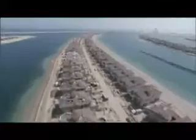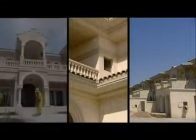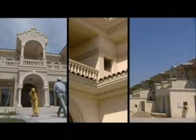Before construction, extensive environmental and baseline studies were undertaken to survey the Palm Jumeirah site. Our specialist marine biologist investigations determined that 95% of the sea floor beneath where Palm Jumeirah is now was in fact bare mud and sand. 5 years after the first grain of sand was laid in the Arabian Gulf, the handover of Phase 1, which includes over 4,000 residences, fast approaches. Palm Jumeirah will open to its first residents at the end of 2006.